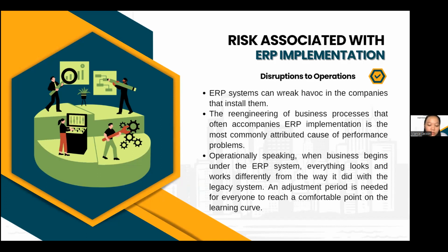And the most notorious disruption case in the press was Hershey's Foods Corporation, which had trouble processing orders through its new ERP system and was unable to ship products. As a result of these disruptions, Hershey's 1999 third quarter sales dropped by 12.4% compared to the previous year's sales, and earnings were down by 18.6%.